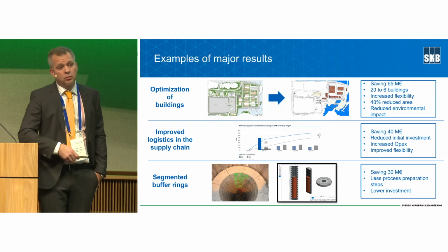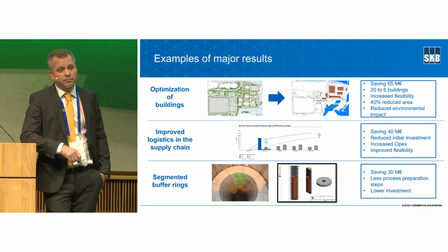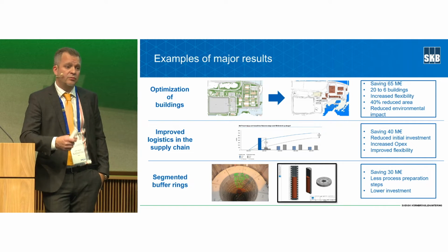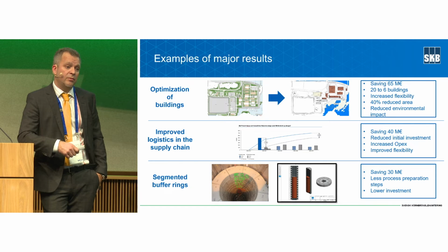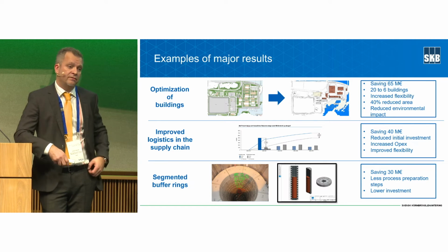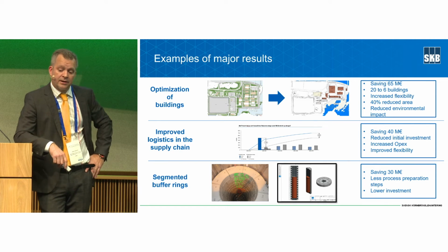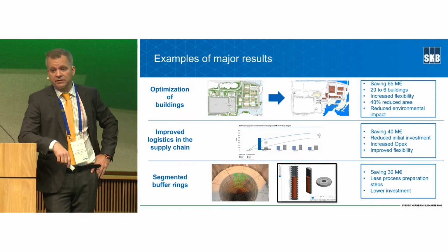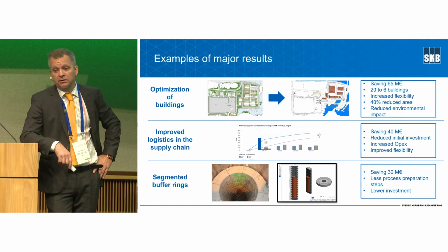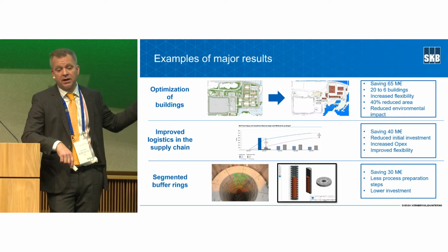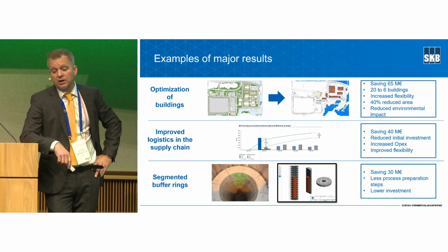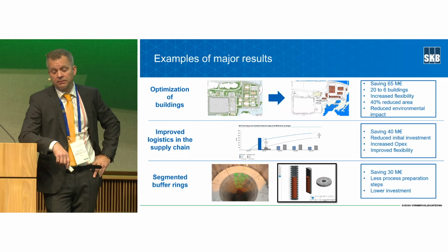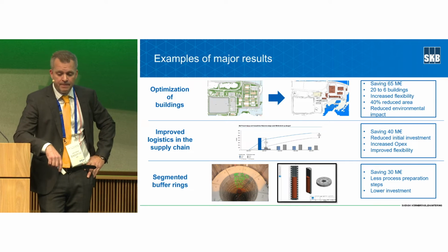We challenged that as well and said, let's purchase smaller bulks, have smaller storages, and put it right away on site in Forsmark. And that reduced the initial investment quite dramatically. On the other hand, we have higher operational cost, but in total, it's a quite large saving doing that.